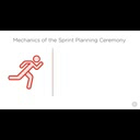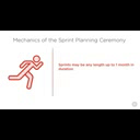The first is that sprints can be any duration up to 1 month, with 1 week, 2 week, and 1 month being the most common durations within that. Since this is our first time working in sprints, we've chosen to start with 2-week sprints. This strikes a nice balance between a sprint that's not too long or too short, so it's an ideal duration for a team that's new to Scrum to start with.